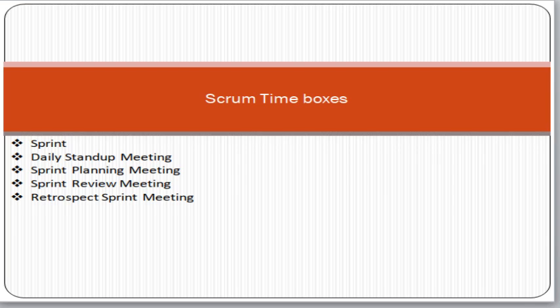Let's take an example of an e-commerce solution. Suppose in the e-commerce solution you have to deliver to the customer, there are 40 tasks. So what you can do is divide the project into multiple chunks. Each chunk will be considered a sprint. A sprint is a 3 to 4 weeks time period. You can take 10 tasks from the product backlog.